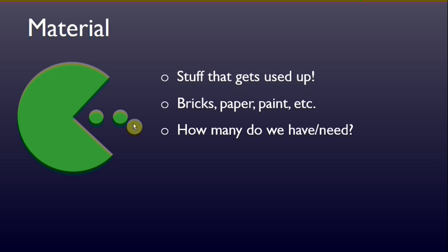So factors that we want to consider is how much of that material or how many of that material do we have and how many do we need. And Project is going to help us estimate that a little bit. And at what rate are they used up? There's certain material resources that are kind of finite, like how many bricks you need to build a house. But there's also material resources that you're just going to continue using throughout the course of a project. That's kind of an infinite. You're going to use it for as long as you're doing a task. And we're going to get in very great detail on that later.